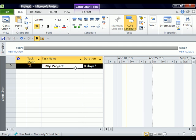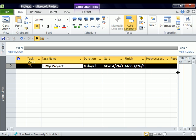And what you'll notice is in the Gantt chart view, I now have whatever I typed in that box. And overall, it's going to track totals. The start date, the total finish date and total duration. I like this because it gives me a high level snapshot. This is not the same as summary tasks. In fact, I can't get in here and edit this at all. It's simply tracking everything that's going on below in the project and giving me totals overall. You don't have to do this, but it is something that I do like to do. And you can't just insert it and turn it on as a project summary task without first going into properties, then going into options on the advanced tab and checking that box to turn on the project summary task. You can't just insert it on the task menu.